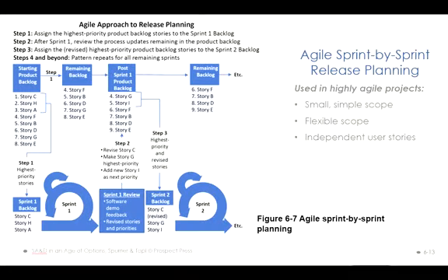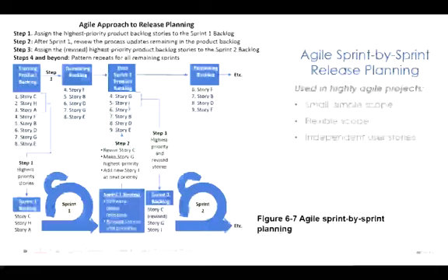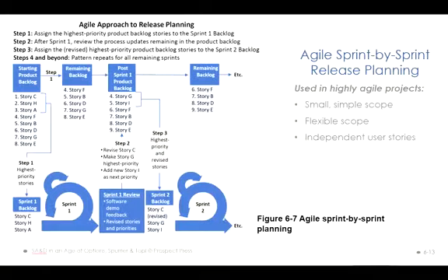When you go into the next sprint cycle, there might be additional stories coming into your backlog, and the backlog needs to be reprioritized again. So unlike traditional just-in-time management, where every inventory part is the same, in the software Agile methodology the backlog needs to be prioritized every time you try to use it.